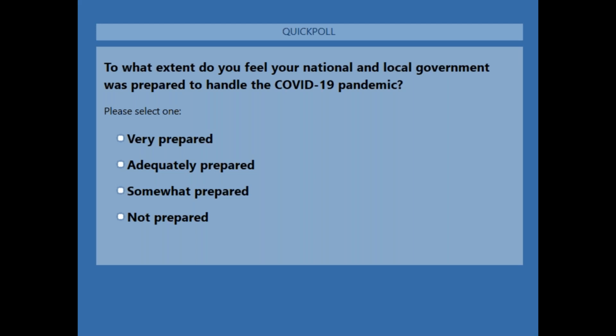When we look at ISO 31000 and its risk management methodology, they start with the fact that you need to establish your context. What are you doing a risk assessment around? In other words, what's your scope? We'll talk about that a little more. As part of the risk assessment, you need to identify your risks: what may happen and why. You need to analyze your risks: what are the impacts? You need to evaluate those, which looks at the probability or likelihood. Then you need to put together risk treatments, which is part of your risk strategy: how to mitigate the impact or likelihood of the risk occurring. And finally, you need to monitor, review and communicate.